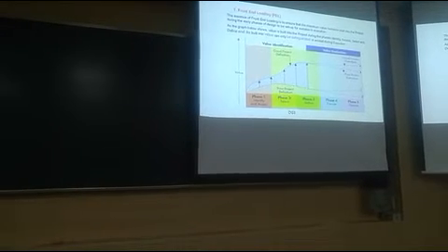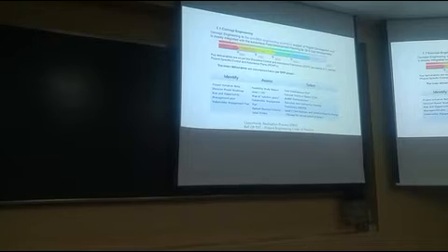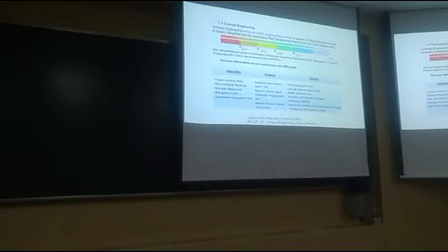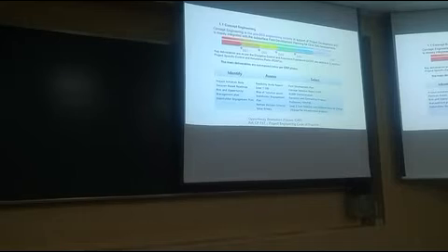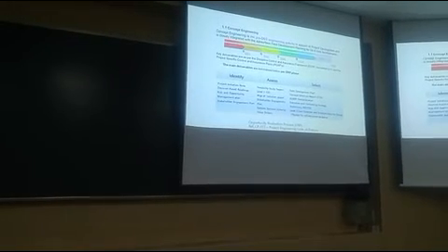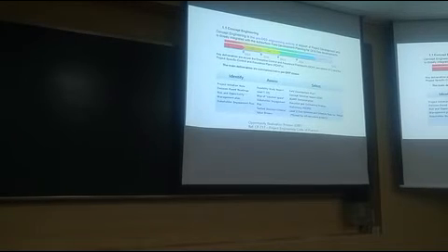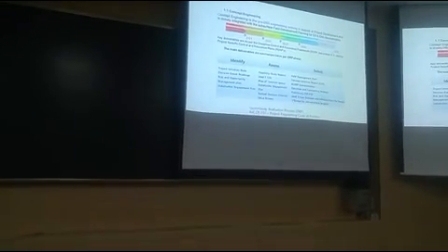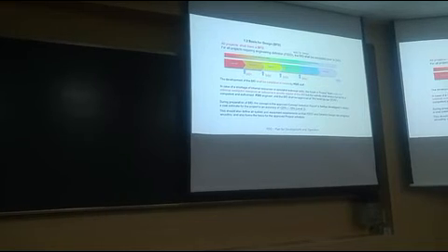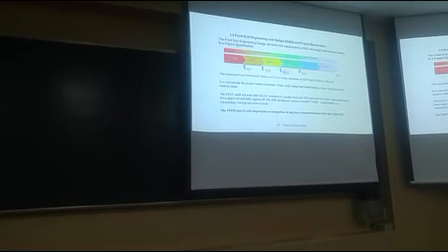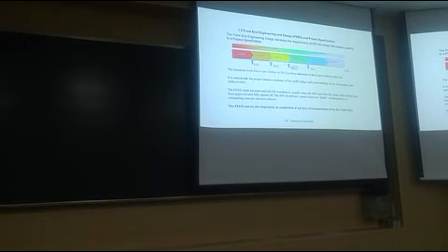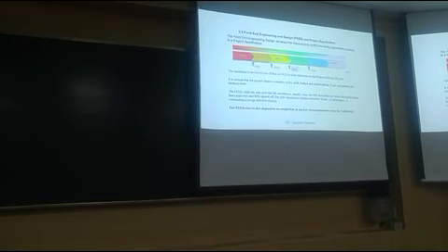So first, DG means design gate. FEED is done in design gate 3, and before the FEED, you need a concept. You must identify what you need, what they need, and assess, make some concepts and select your concept, and make a basis for design. And in design gate 3, you use the basis of design and do your FEED and make a contract.